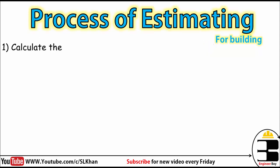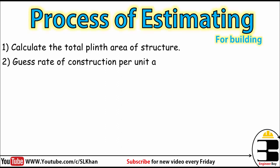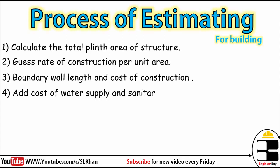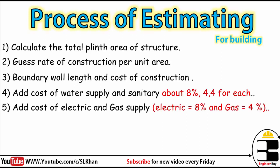What steps should we follow to do the rough cost estimate of a building based on the plinth area of structure method? First, we calculate the total plinth area of the structure. Then we guess the rate of construction per unit area. Then we calculate the boundary wall length and cost of construction. After that, we add water supply and sanitary cost — about 8% and 4% each.